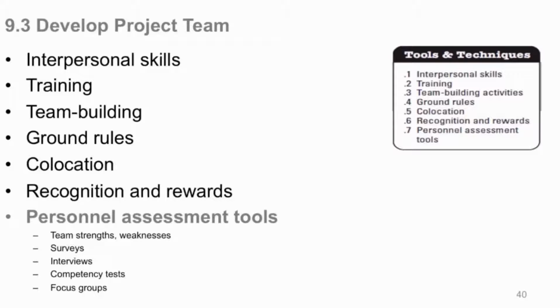We made a mistake. We just didn't look at them in deep enough detail at the beginning. We'll swap them out. And if you swap out staff, what do you need? You need a change control. As odd as that may seem to some of you, change control. Here goes Sue. Here comes Bob. You have a record of it.